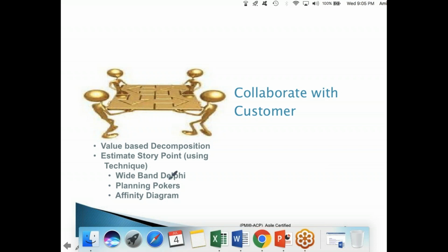So when it comes to story point estimation, Krishna asked a question: estimation is given based on user story. Yeah, based on user story and depending upon the complexity, how difficult it is to do, the effort it takes. So you said eating grape is 1, eating apple is 5, is the effort. So the effort you are taking to eat the complete grape compared to the effort you put to eat the complete apple, right? And what are the different ways of giving story points to this?